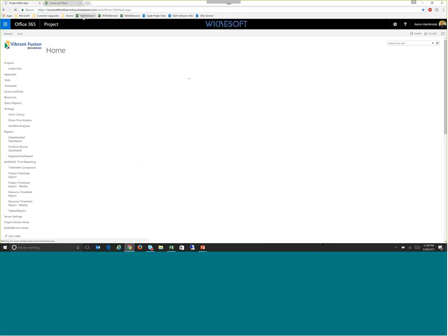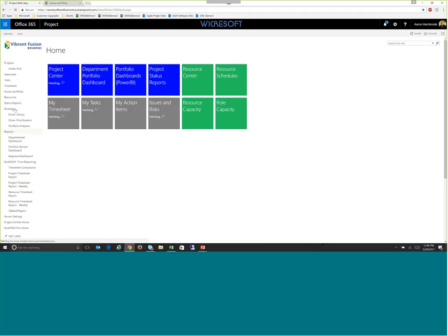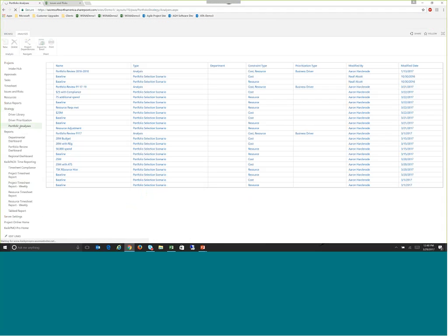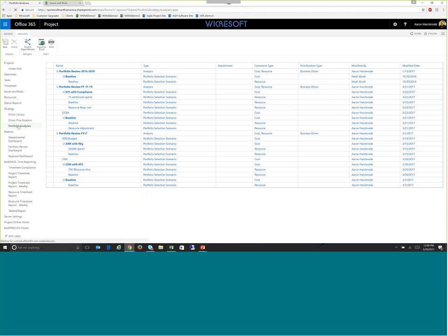So what I'm alluding to here is we've got a feature in the Microsoft PPM tool in Project Online called Portfolio Analysis. What people often overlook is, they'll use portfolio analysis periodically. Usually they'll measure proposals against their in-flight projects. Figure out, hey, can we do these proposals? Are they going to have an adverse impact on our portfolio budget? Are they going to have an adverse impact on our available resources? But oftentimes what they won't do is reanalyze in-flight projects, particularly those that have had scope changes, to see if there are any new impacts.